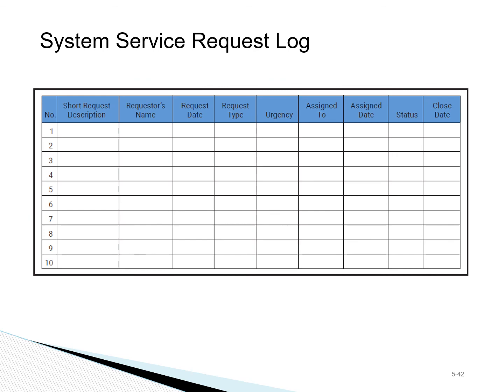After the scope is finalized, all requested changes to scope need to be reviewed, assessed, and decided on. As part of the analysis of each request, we need to assess the impact on cost and schedule, and that information needs to be in place before approval of the change.